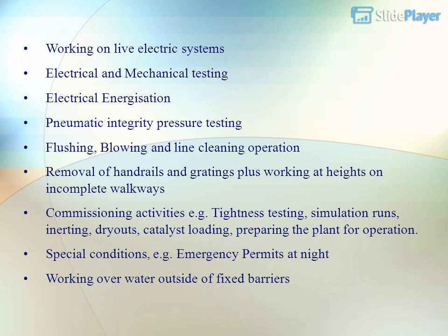Electrical and mechanical testing. Electrical energization. Pneumatic integrity pressure testing. Flushing, blowing and line cleaning operation. Removal of handrails and gratings plus working at heights on incomplete walkways. Commissioning activities, for example tightness testing, simulation runs, inerting, dryouts, catalyst loading, preparing the plant for operation. Special conditions, for example emergency permits at night. Working over water outside of fixed barriers.